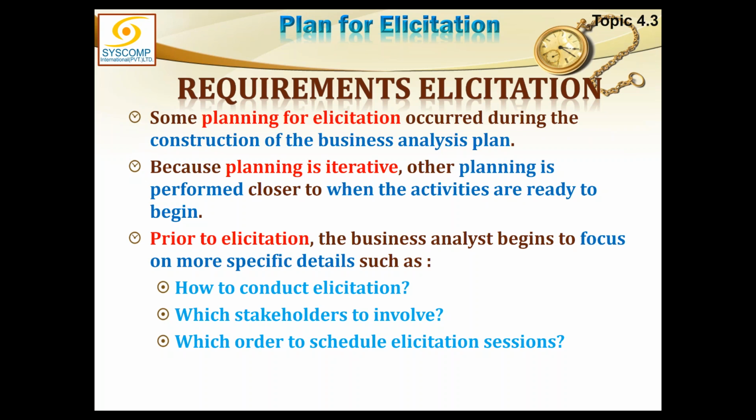So the first stage was the top level management. Whatever information they could provide, they did provide. Then I moved on to the next stage, and that was the focus group. And the last stage was when we were doing the facilitation sessions, and those facilitation sessions were generally with the employees of that organization who were involved in that job. So it could be done in tiers.